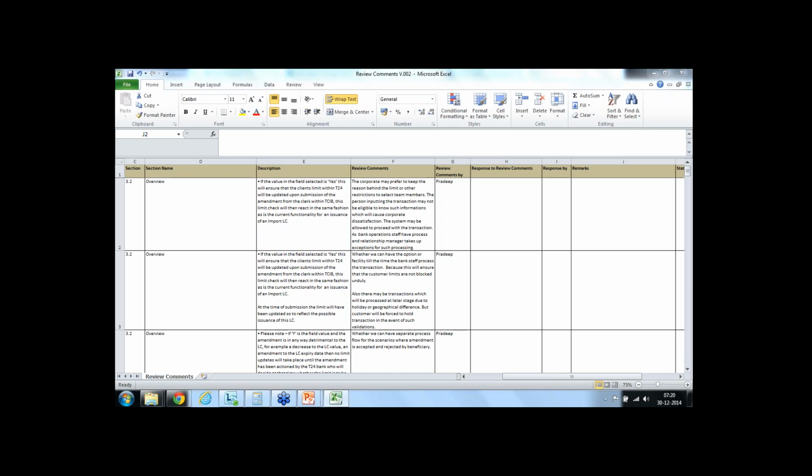So it's up to you to identify these dependencies, and if you miss any of them, your project will probably end up with some unstable activity coming at one of the later stages. One of the best examples is that you are building an IT system where you want to talk to a bank. Suppose you build your systems and design your data output and data intake based on your understanding. And finally, when you go to the bank to integrate the system, you realize that your system is talking in a different language from the bank system.